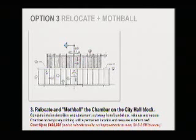The cost for that is up to $400,000, and we need to be clear that that is just the cost to temporarily relocate the structure on the City Hall site. No improvements or interim uses would be allowable with that cost expended, and we've been working with Jim Meander and Mackenzie Commercial to think about what it would cost to reuse, and it's probably $1.5 to $2.5 million to move the chamber into a reusable condition. So there would be additional costs to go in that direction.